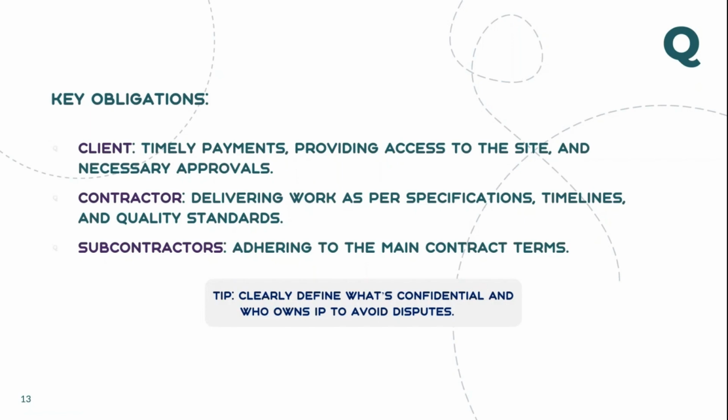On the contractor's obligations, you have to check with your tendering team, estimation department and planning department to ensure that whatever they write in the contract as your obligations matches the scope highlighted in the RFP or tender document. If you have not priced for something and they include it in the contract, you have to put up a red flag and say this is not in my contract.